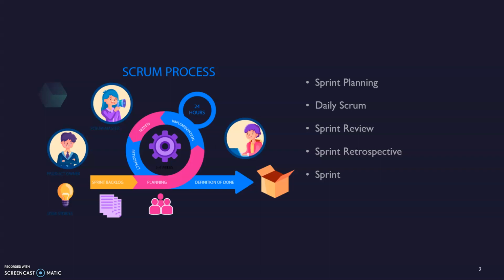During a sprint review, the Scrum team invites stakeholders, senior leaders, and affected departments to discuss what was completed during the sprint. They adapt the product backlog as needed based on this feedback. The product owner then has the option to release any of the completed functionality.